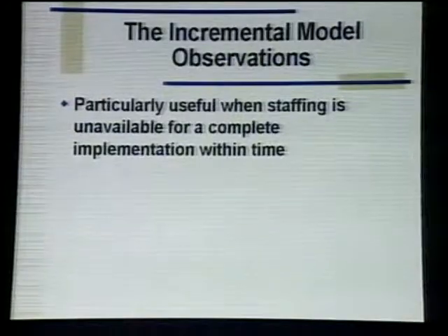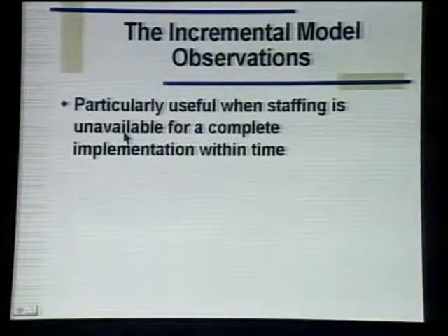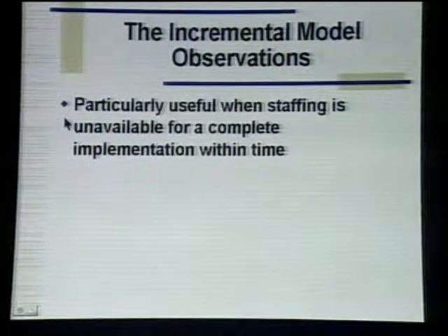Dear students, this model also has some good points and some bad points in it. The incremental model is particularly useful when staffing is unavailable for a complete implementation within time. For example, if a business wants to develop a complete big software and they do not have enough resources, then they can start developing a core product which provides the basic functionalities.